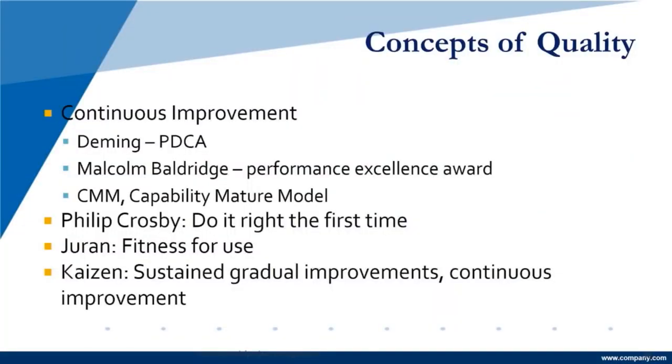With the Capability Maturity Model, what they're saying there is that you can mature to have more standardized processing through time. Meaning, if I always have a project charter and I have a documented work breakdown structure, if I have sign-offs between certain phases of the project, if I'm doing a development project, it may be between the requirements sign-off. I have a sign-off there when the requirements are done and approved, to the design of the application, to the development, to the testing, out of testing into production. These are concepts that the Capability Maturity Model looks at.